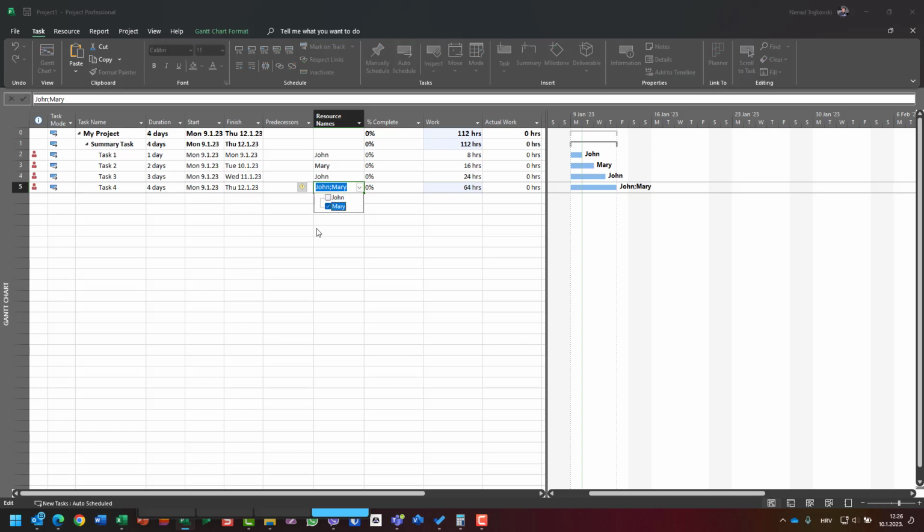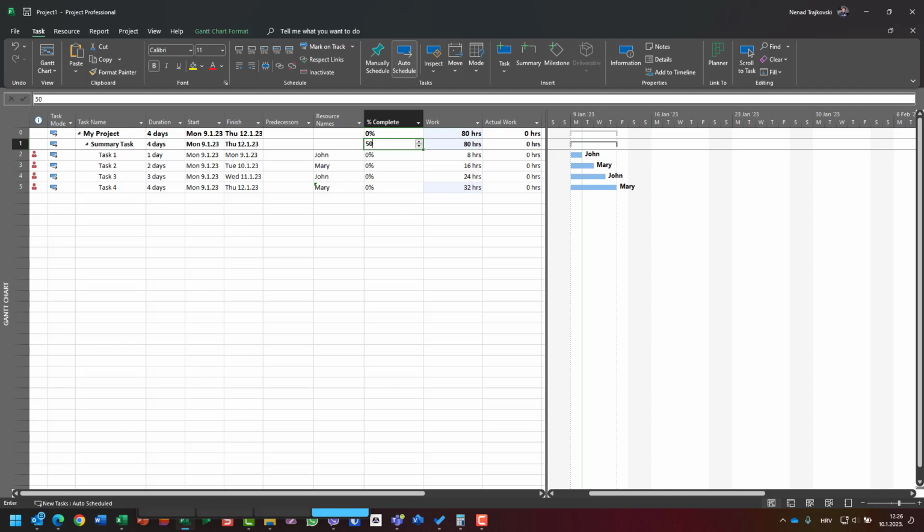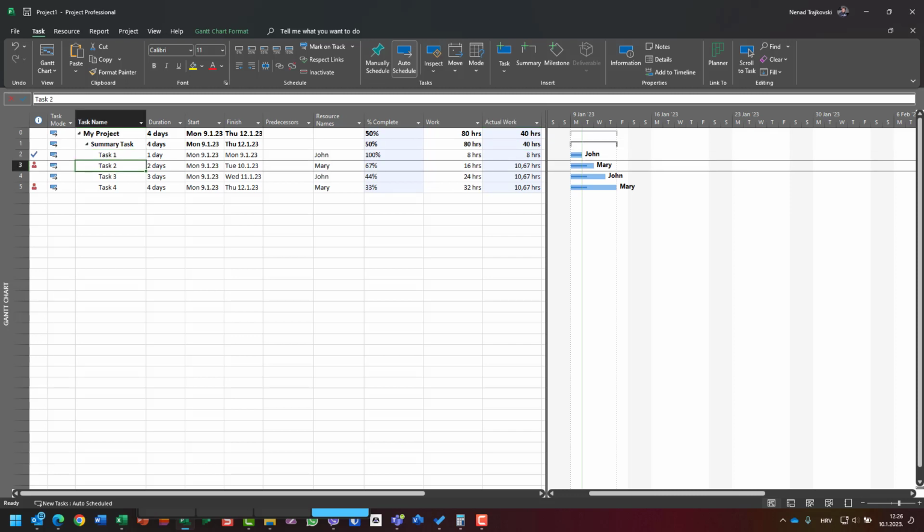Oh, no, just Mary. Okay, now, you will see that if I put 50% here, I will have something strange. It's 100%, 67, 44, and 33. Why? I have 40 hours, and those 40 hours are equally divided between branches or paths, as we know. So 40 hours divided by 4 branches is 10 hours for task 1, 10 hours for task 2, 10 hours for task 3, 10 hours for task 4.